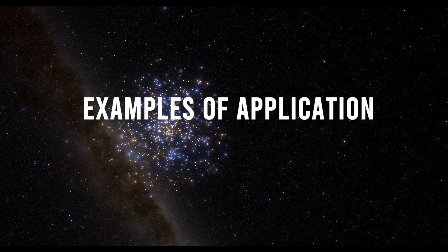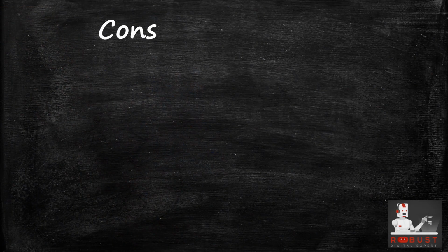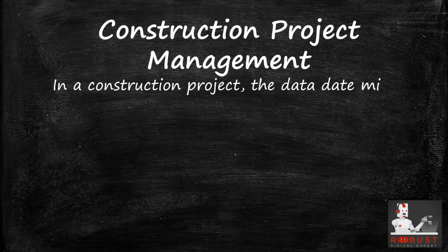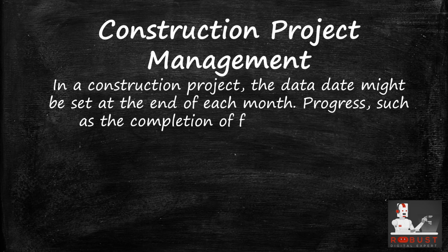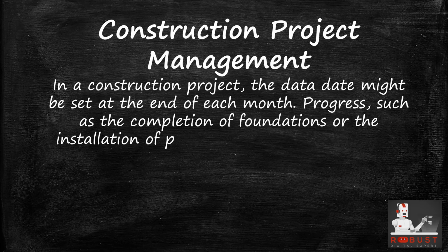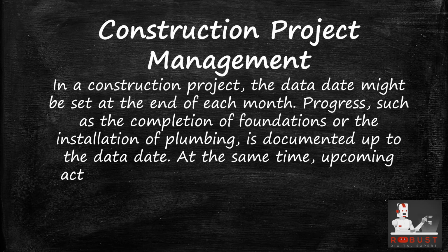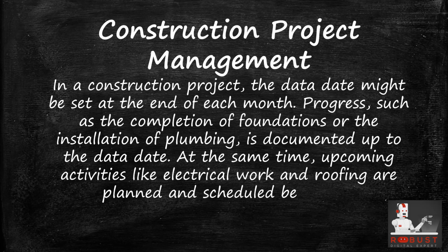Examples of application. Construction project management. In a construction project, the data date might be set at the end of each month. Progress, such as the completion of foundations or the installation of plumbing, is documented up to the data date. At the same time, upcoming activities like electrical work and roofing are planned and scheduled beyond it.